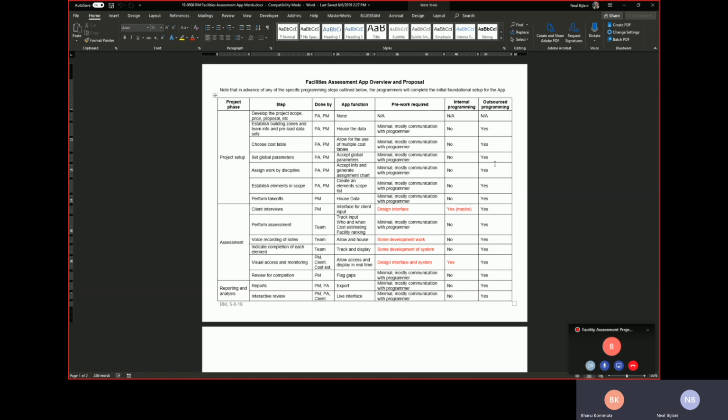Usually the speed is about, if they're not really gigantic buildings, you can probably do 3 or 4 a day. Oh, that's cool. But at least that makes the check-in a starting point, and then if you don't get an email of items completed, it means it is not done yet. If you got the email, it is done on the same day. If you got the email the next day, then it means they are done.